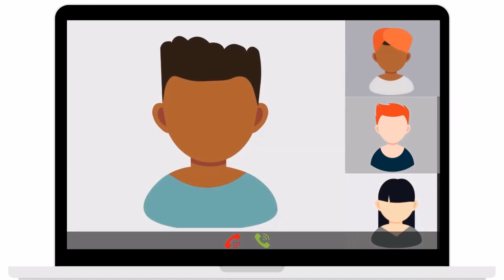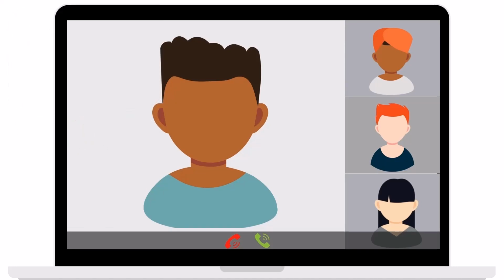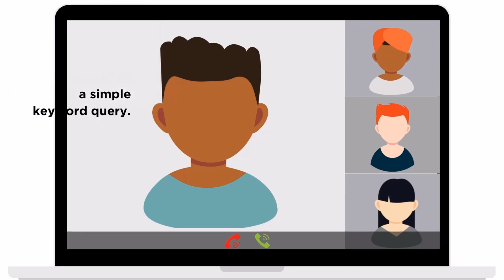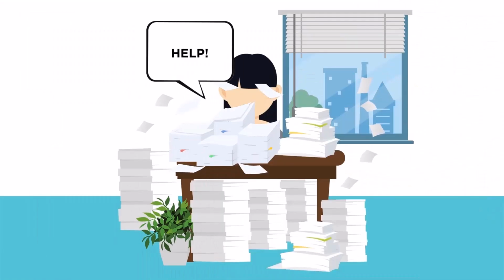Engaged product owners also enter sprint planning having a good idea of what they want the team to deliver by the end of the sprint. They might have a specific set of high-priority backlog items in mind, or they might have a more general notion. Knowing that the sprint goal helps a team balance competing priorities, a product owner should communicate his initial sprint goal in a way that doesn't unduly influence the development team to commit to more than it can realistically deliver.